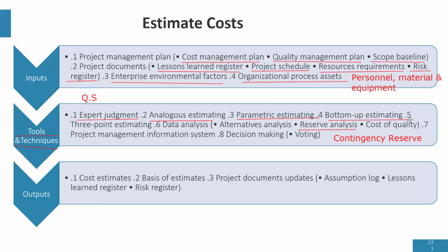Bottom-up estimates, I'm just reminding you of these estimating methods. We've talked about them, but in this case, we're using them to estimate cost. In bottom-up estimate, whatever you want to estimate is first of all broken down into subtasks, and then you now estimate each subtask and add up to get the final estimate.